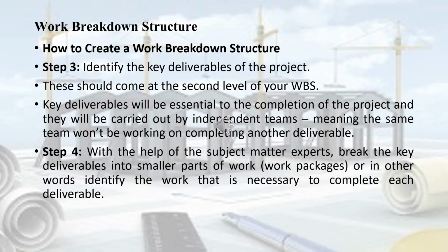Step 4, with the help of the subject expert, right? So break the key deliverables into smaller parts of work, or in other words, identify the work that is necessary to complete each deliverable.